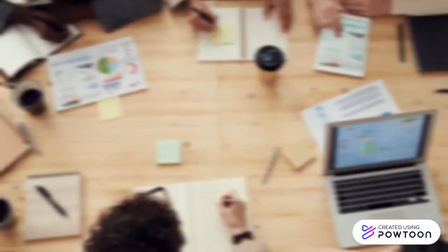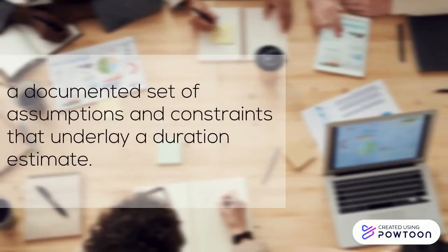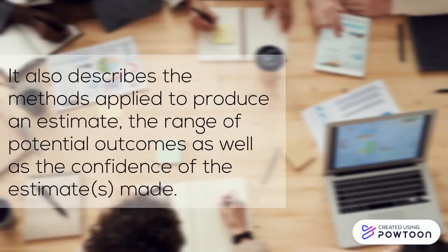So with that said, what is the basis of estimates? The basis of estimates is a documented set of assumptions and constraints that underlay a duration estimate. This document also describes the methods applied to produce an estimate, the range of potential outcomes as well as the confidence of the estimates.